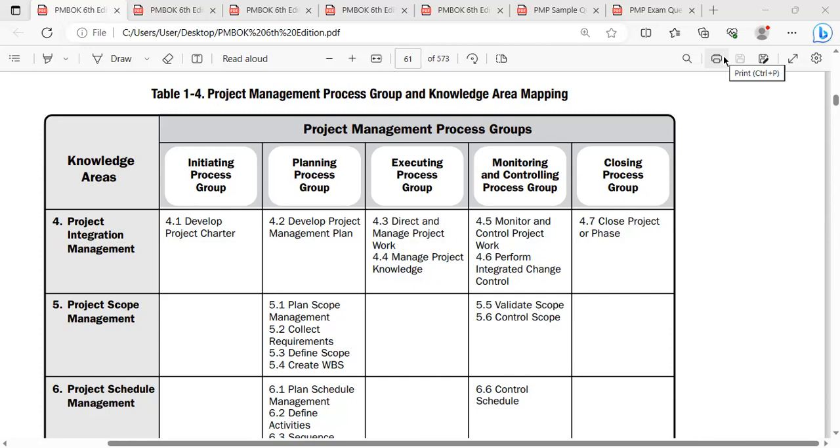So you need to make sure that you know your stakeholders, because why do I need to identify my stakeholders? Because once you are creating the project charter, my voice is clear, right? Once I'm creating my charter, I am not able to bring the complete stakeholder list into the project charter. I'm able to bring only the key stakeholder list. Before I'm commencing to develop all the management plans, I need to develop the stakeholder register.